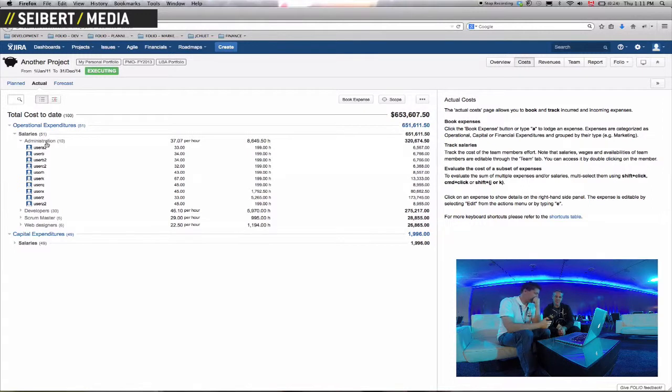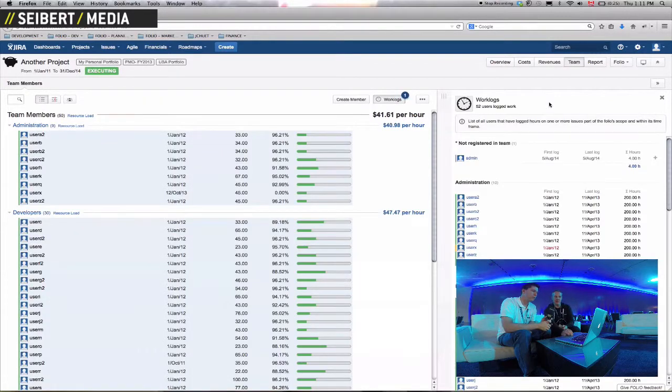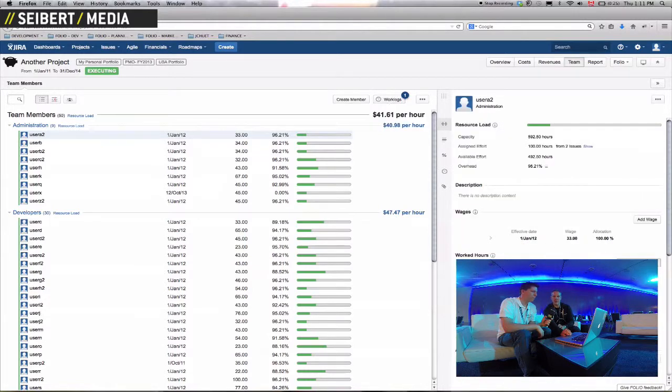And I learned that I can use that both when I have booked times and also if I don't book times, right? Exactly. So you have three ways of dealing with hours for team members. The first thing you'll have is the work log option. So you can sync FOLIO with the work log. So we'll actually get all the work logs from JIRA, even if you enter it by Tempo or timesheet or any other add-ons. You can always overwrite whatever was entered in a work log. It doesn't alter the work logs. It's kept in FOLIO, so you can always jump back to the work log.